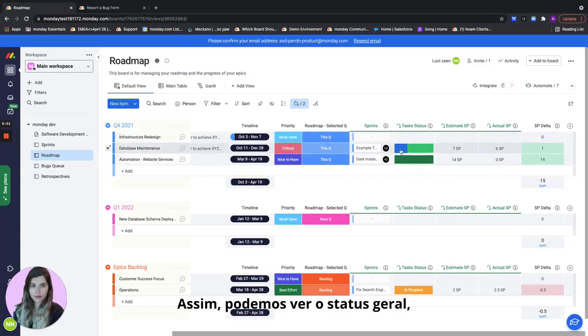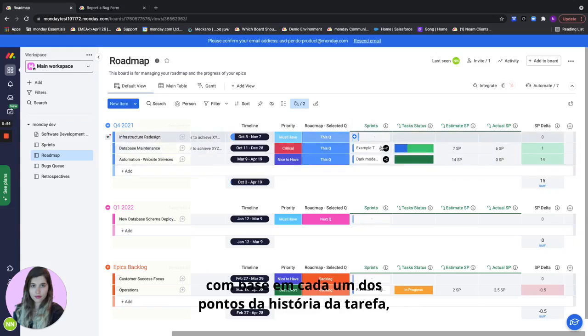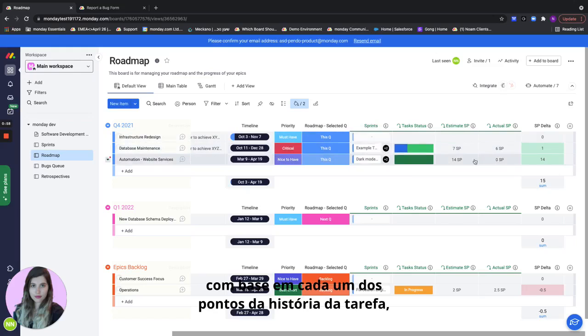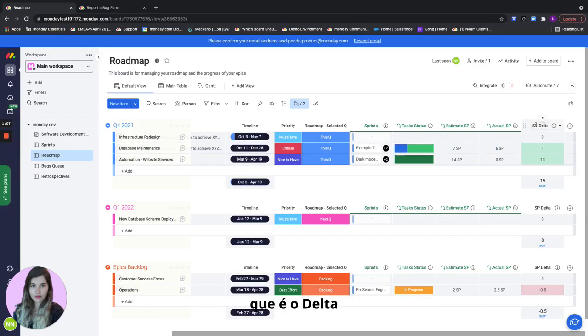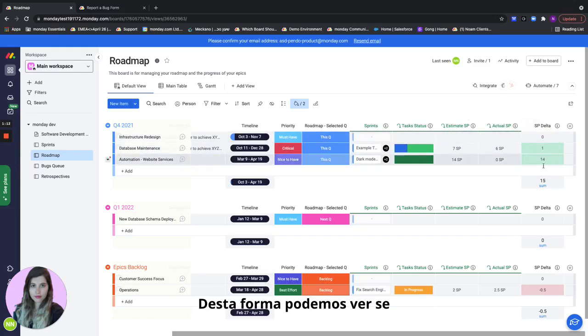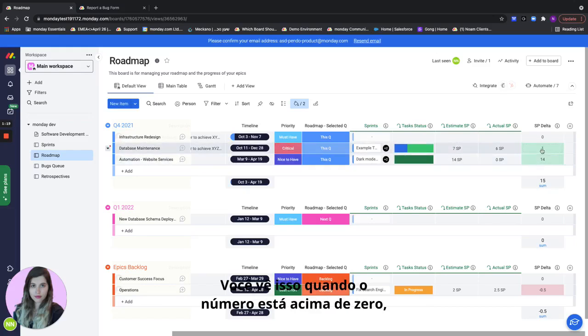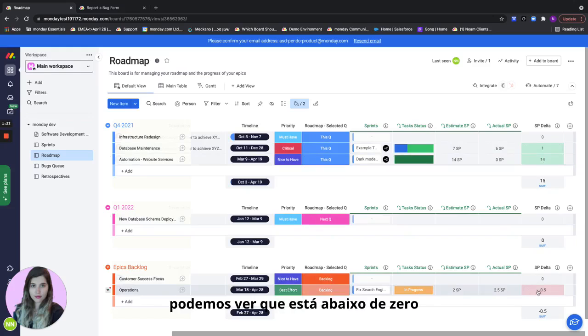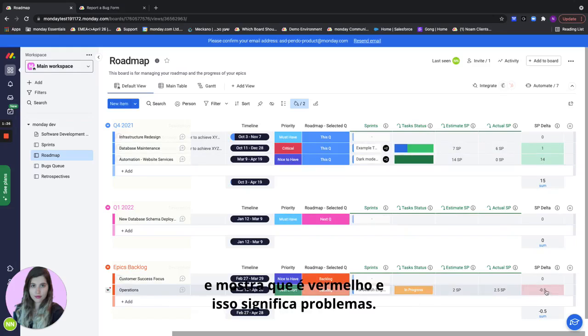We can see the overall status, a sum of estimated story points spent on this epic based on each of the task story points as well as actual story points based on the actual tasks. And we have a very important field which is the delta between the actual story points versus the estimation. This way we can see whether we're going to finish things on time and whether we're on track or not. When the number is above zero it shows as green meaning I'm good but right here we can see that it's below zero and it shows as red and that means trouble.